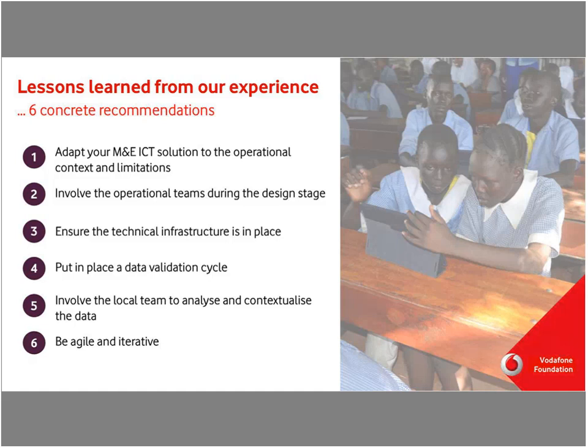The data validation cycle that we have in place, so having the project manager reviewing the entry from the INS coaches, is an important key success factor because it enables the team to be fully aware of what's happening within the camp, but also it enables some data validation and making sure the data going through the platform is actually verified.